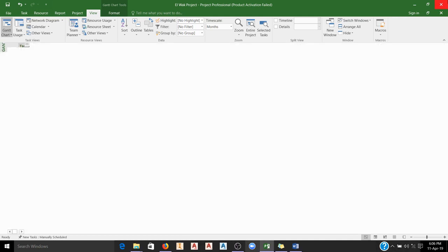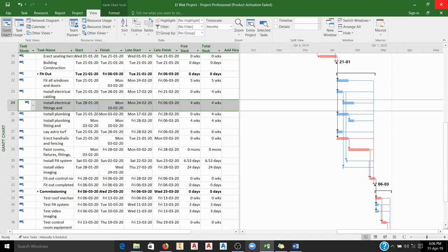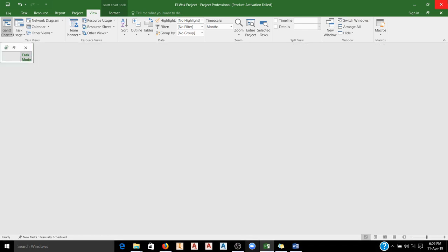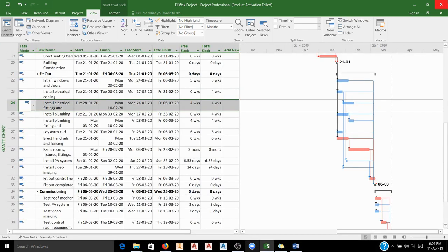So within the 5 days, it will assume that there will be masons who are working there. It will assume that there are carpenters or whoever who are working there, on and on. And that is actually the wrong idea, because within the 5 days, that is not what is happening. Rather, we are just allowing time to elapse. Okay, so for us to be able to establish that there is a delay between those two tasks, we use what we are calling a lag time.